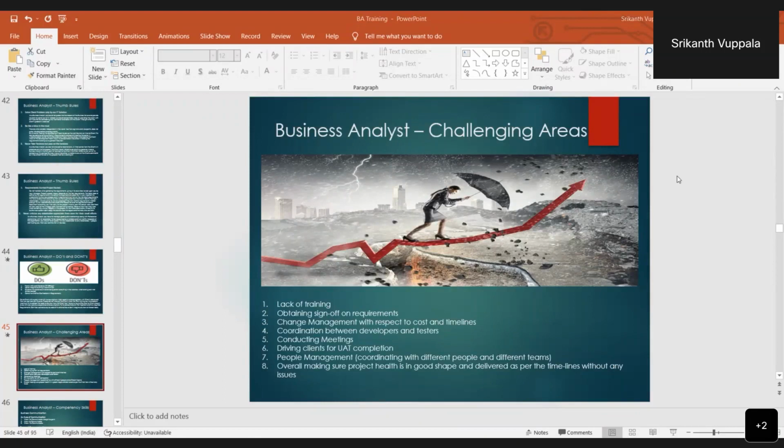Say, for example, there will be some government regulatory rules. If we are doing any taxation kind of software or application, and the government changes the tax slab rates, that has to be implemented immediately in that software, right? We cannot say, once we complete this sprint we'll do that. Those kinds of change requests we have to take care of immediately, on priority.